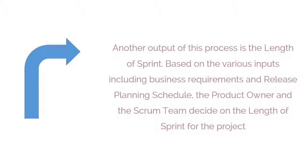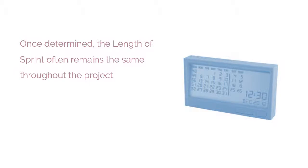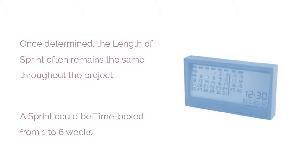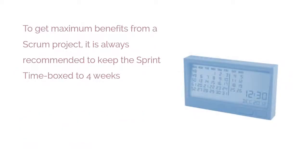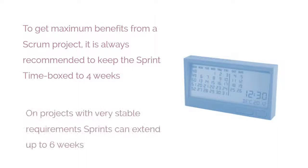Another output of this process is the length of sprint. Based on various inputs including business requirements and the release planning schedule, the product owner and the Scrum team decide on the length of sprint for the project. Once determined, the length of sprint often remains the same throughout the project. A sprint could be time-boxed from one to six weeks. However, to get maximum benefit from a Scrum project, it is always recommended to keep the sprint time-boxed to four weeks. On projects with very stable requirements, sprints can be extended up to six weeks.